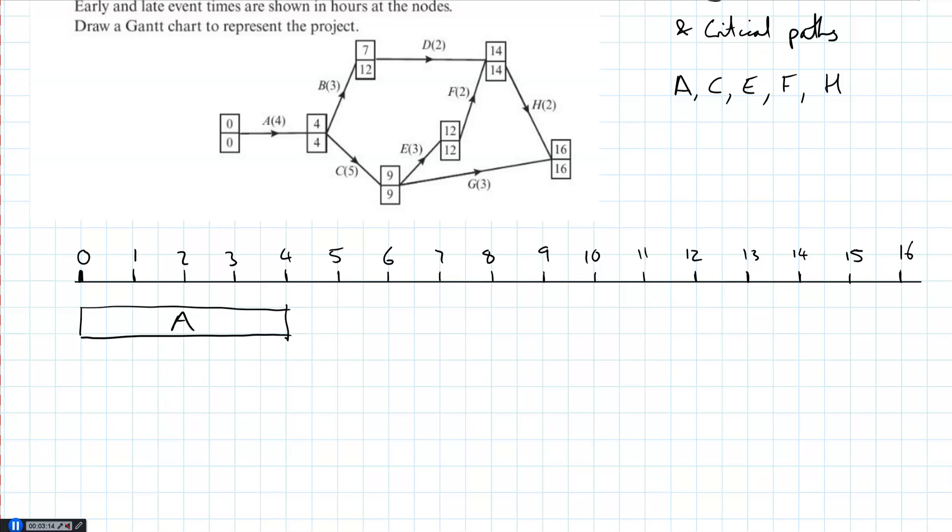C comes next, so C can start at four, last five, so it goes up to nine. E starts at nine, and last three, so it goes up to 12. It should all make sense with the network. F takes two and starts at 12. And then H takes two and starts at 14, and we're done by 16.